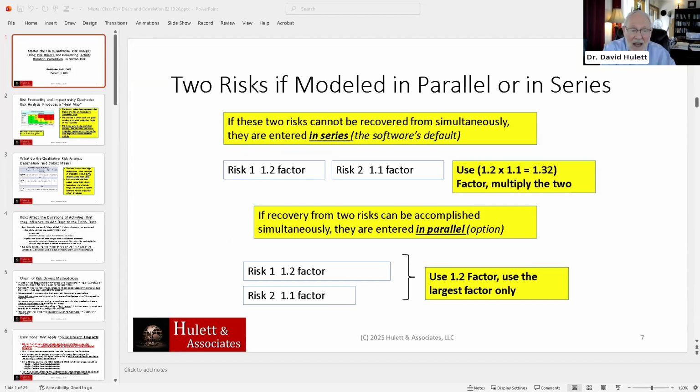And what I mean by that is that suppose you have some construction going on, and there's a huge crane that you probably rent, and the crane breaks. Now, there may be some other things going on, but fundamentally, if the crane breaks, then everything stops until you can get a new crane or you repair the existing one. And once that is done, then there may be some other risks that have to be developed, but there's no sense in doing that until you have survived the impact.